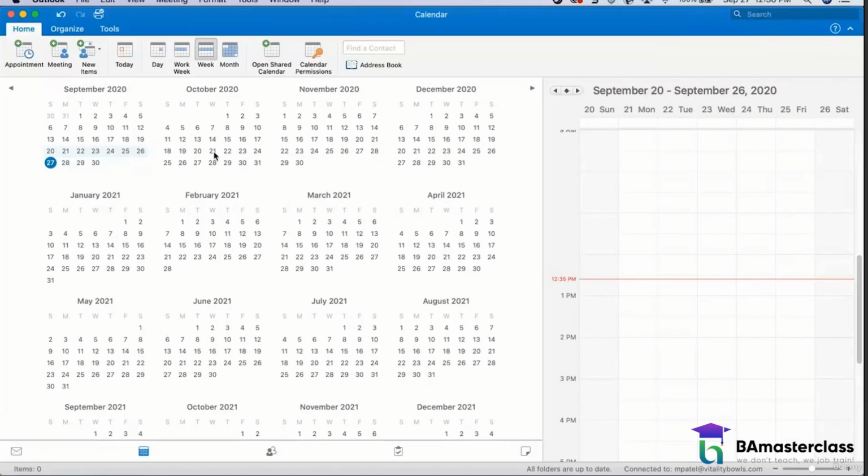So let's say I'm starting up my brand new Agile project and my first release is a monthly release. If it's September, my first release is a 4 week release. Let's say my sprint cycle will start from 5th of October and it's a 4 week release with 2 week sprints. So sprint 1, sprint 2, sprint 3. If I have my release on a Wednesday, what is the first day of my sprint? What day of the week will my sprint start?